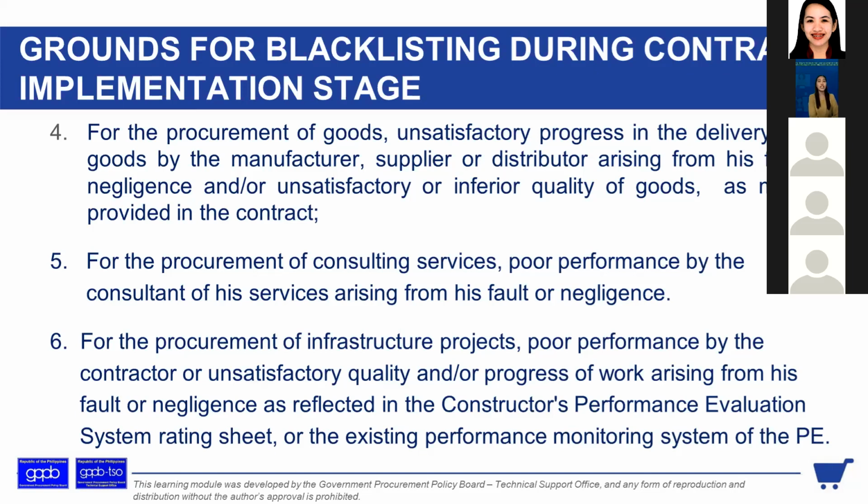We have a Gantt chart for infra. The payment for infra is staggered, based on the actual accomplishment. So based on the Gantt chart and the actual accomplishment, we monitor their slippage.